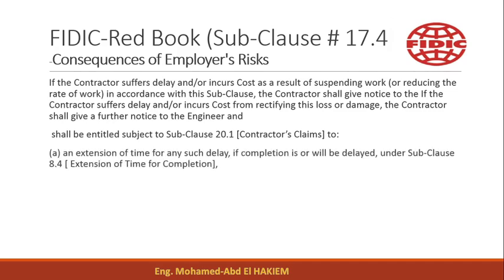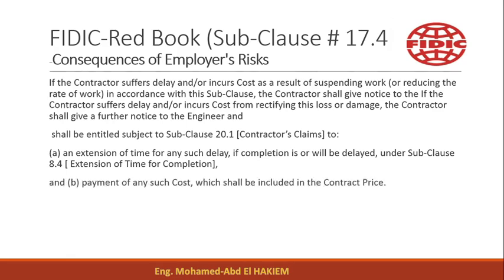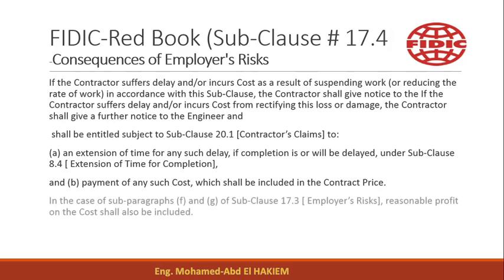A. An extension of time for any such delay, if completion is or will be delayed, under subclause 8.4 – Extension of Time for Completion; and B. Payment of any such cost, which shall be included in the contract price. In the case of subparagraphs F and G of subclause 17.3 – Employer's Risks – reasonable profit on the cost shall also be included.